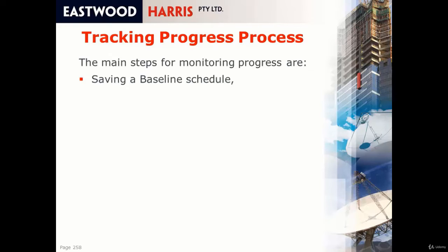Whereas in products like SureTrack and Microsoft Project, they only save some of the information like the start and finish dates and the resource quantities and the resource costs. But those products don't save the critical path and the relationships, whereas P6 saves a complete project. But P6 will not save part of a baseline that you can do with products like Microsoft Project and Asta Powerproject, which allow you to take some activities and baseline just some of them.